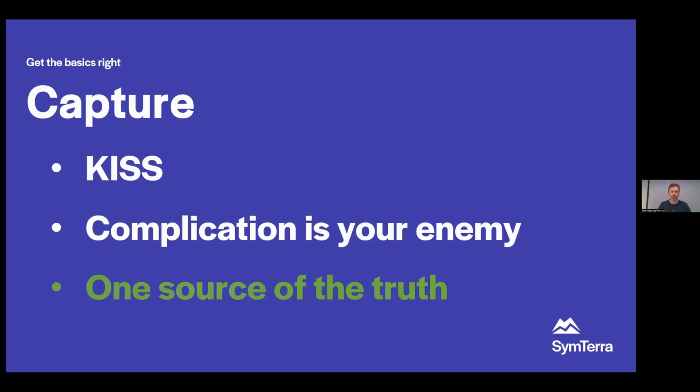And finally, one source of the truth. We always keep saying this on projects. When we finish a project, we're always saying we wish we had that. If we can start everybody on the same system and instill a culture of encouraging team members to record works daily, it will, from the very beginning, be a big change within your business. If needed, you can push data from BIM systems and schedules into common data environments automatically for those on the larger, more complex projects. But at a very simple level, having this in place means that everyone's default position is to go to this one bucket of information. Make it too complicated or limit access, and you reduce the effectiveness of what you're trying to achieve.